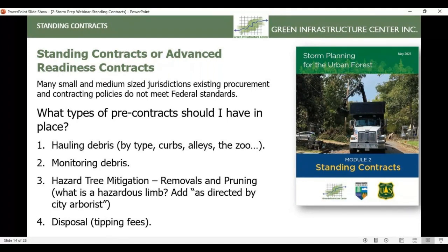Places where you just don't have a road or any sort of infrastructure that can support these trucks. So think about all those unique situations that you have, and create a separate unit price and a separate scope of work for that. Describe how you want that done in your specifications, and then get a separate cost for it. And then the monitors just monitor it separately because it's done at a different cost.